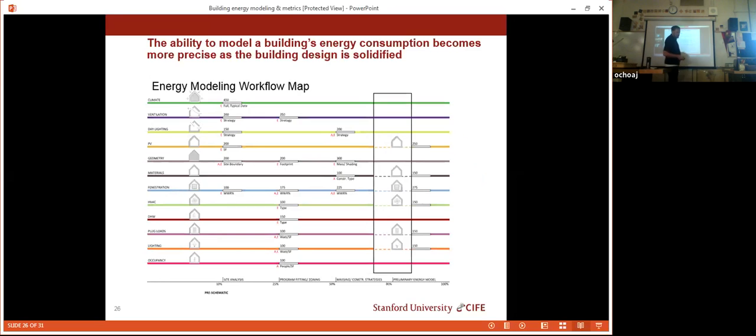Okay, so you have the absolutely correct answer. It's degrees of completion of the design. I don't know who made this graphic because that's pretty small print. But just like this building here, when I did the back of the envelope estimate of the energy consumption, that was literally level of detail 5%. There's no real design. It's probably this, this, and this, plus or minus half to twice. As an engineering thing, I'm probably in the ballpark.